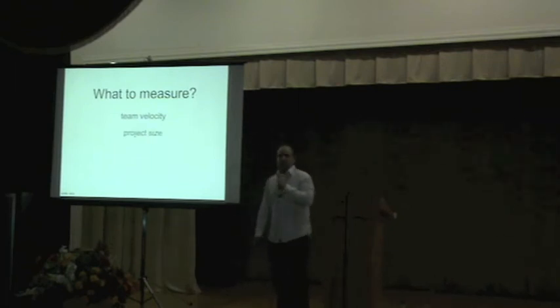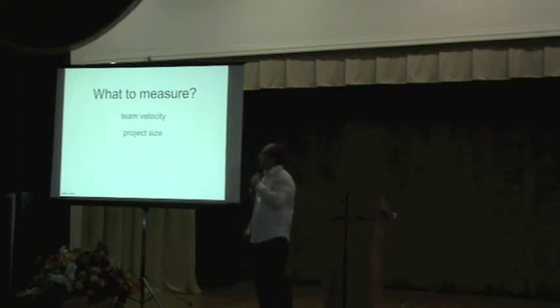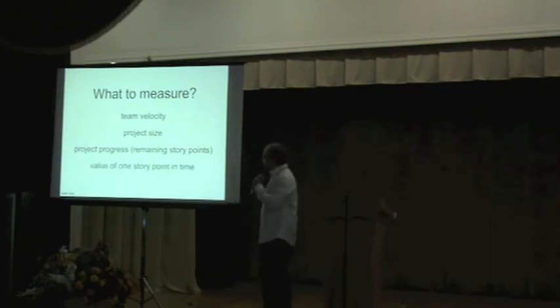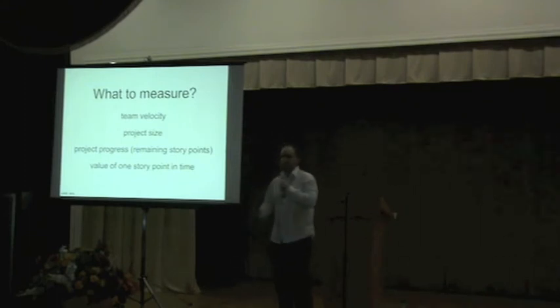From my perspective, it's quite important to measure project size, so you know how a project is growing in terms of lines of code. Progress, so if you have a lot of stories to be done in a project backlog, you need to have a look if the number of them is going down, so if you're likely to finish this project in a reasonable time. Last thing is quite interesting. The value of one story point in time. You can have a look during different iterations.